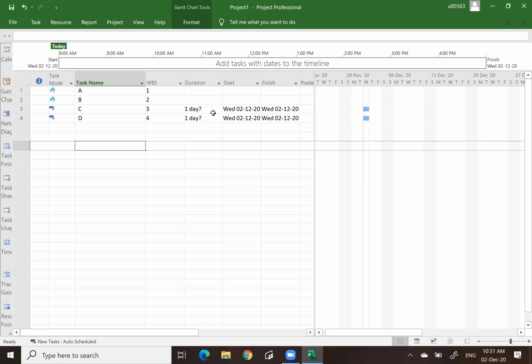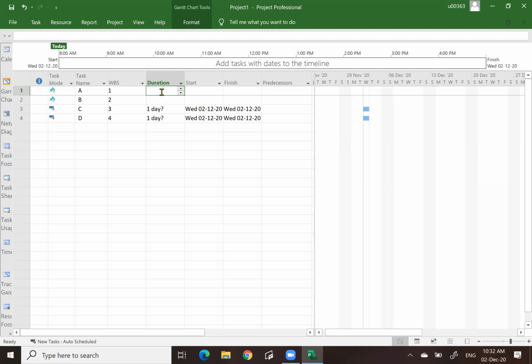And you might notice immediately the differences between manual and auto. Look at the format that you need to input. The format is automatically shown, that you need to input in such format only. Otherwise, the computer will not accept those values. But for the manual scheduling, the duration is not being asked.